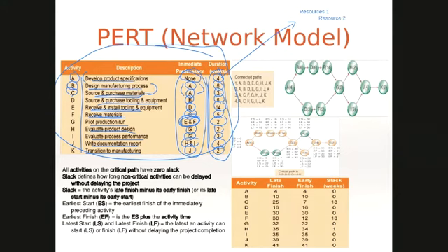So going back to it, what you're doing here is you're starting by saying, we begin with A. After A, it diverges into B and C. Once we get B and C done, D depends on B, E depends on D, F depends on C. Once E and F are completed, only then can we begin G. Once G is completed, then we can pass out the work to H and K, which can be done in parallel, but H and K both need to be completed before we can begin J. Once J is completed, then the end run is on K. So that's exactly what it is.